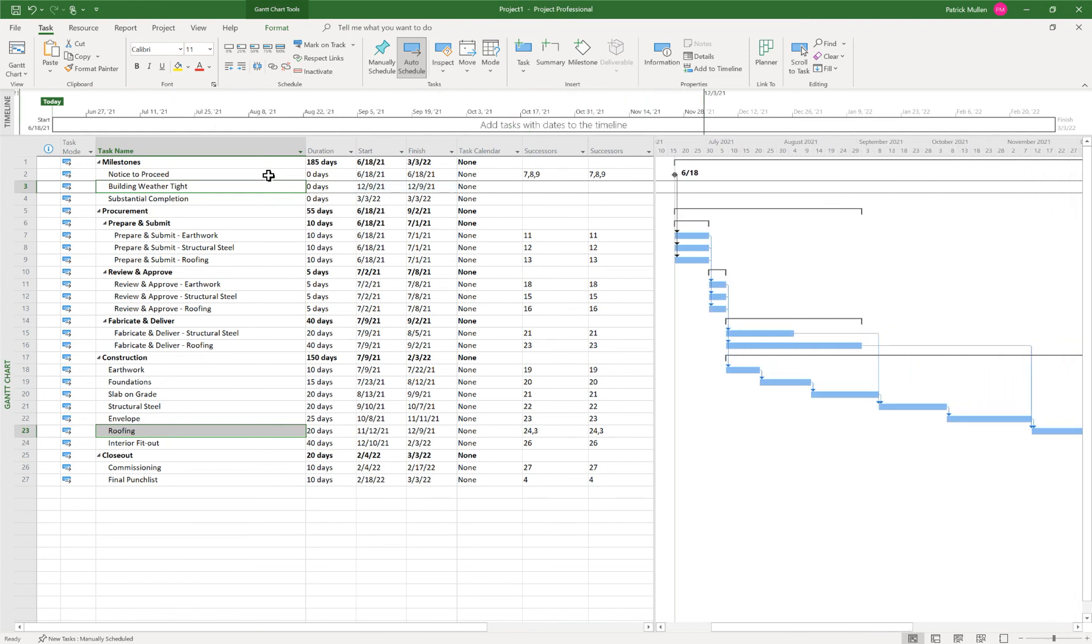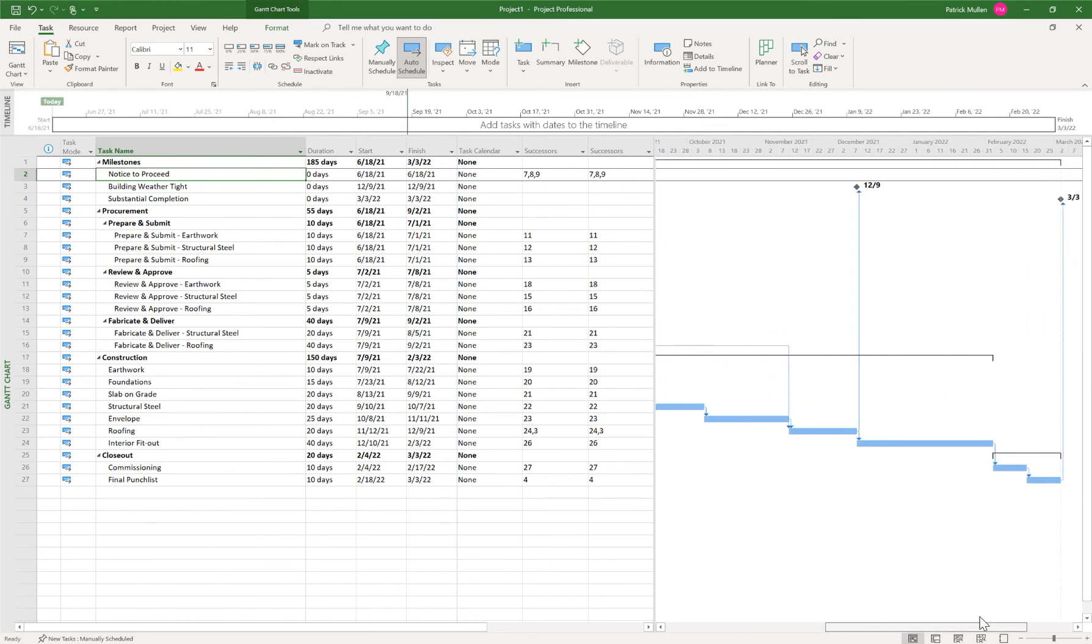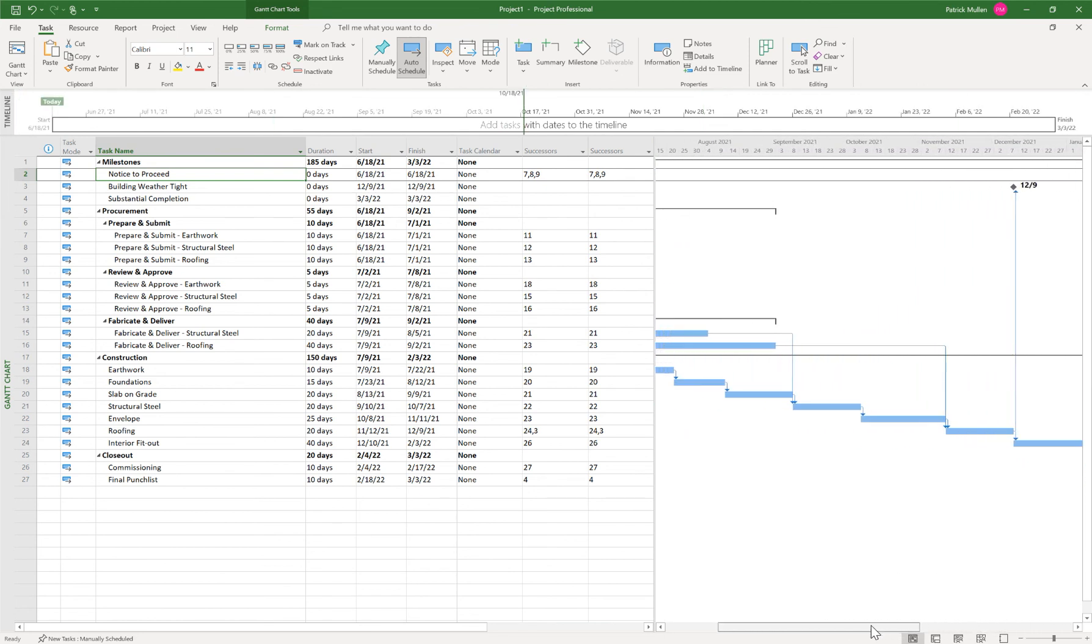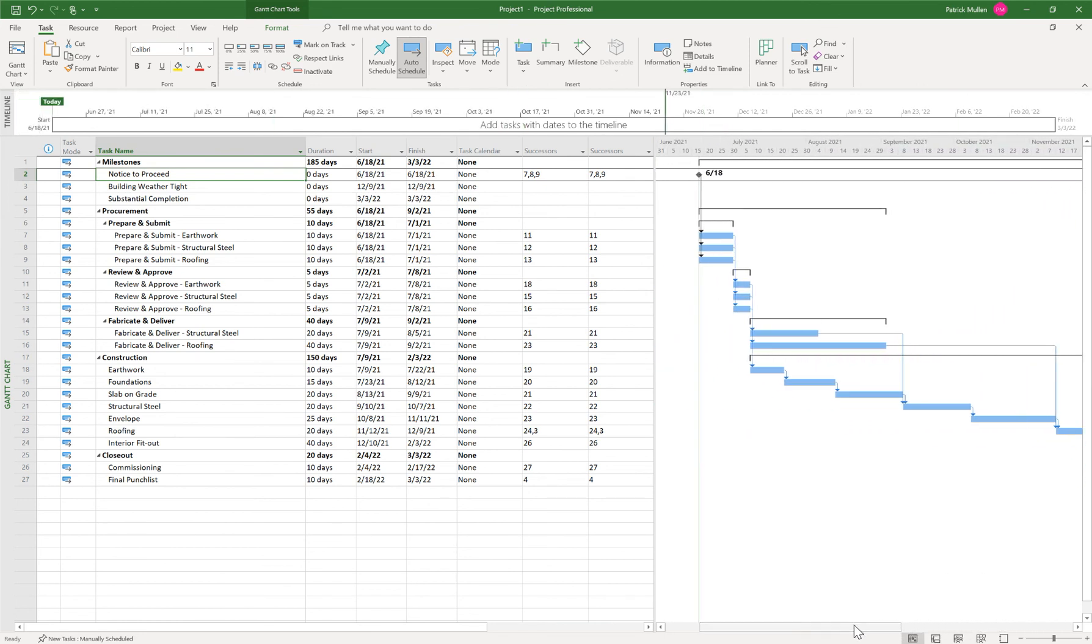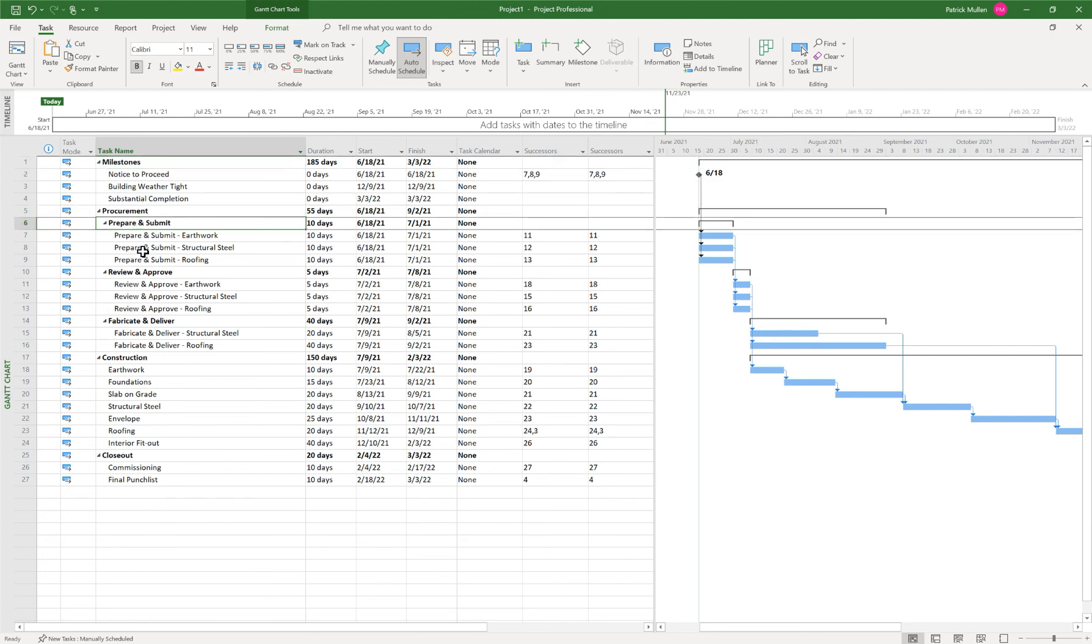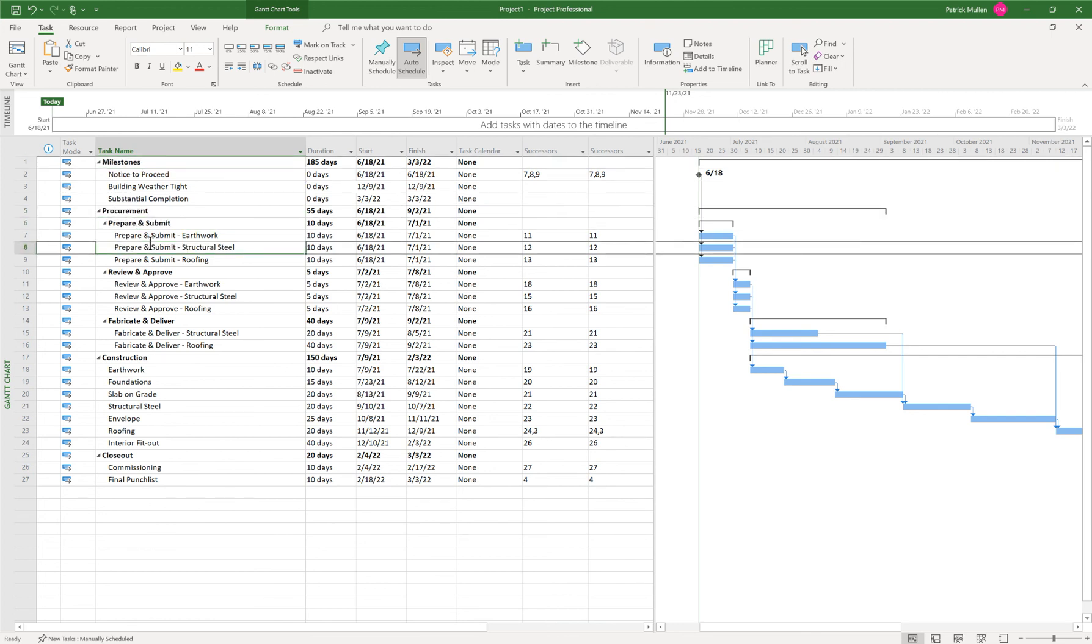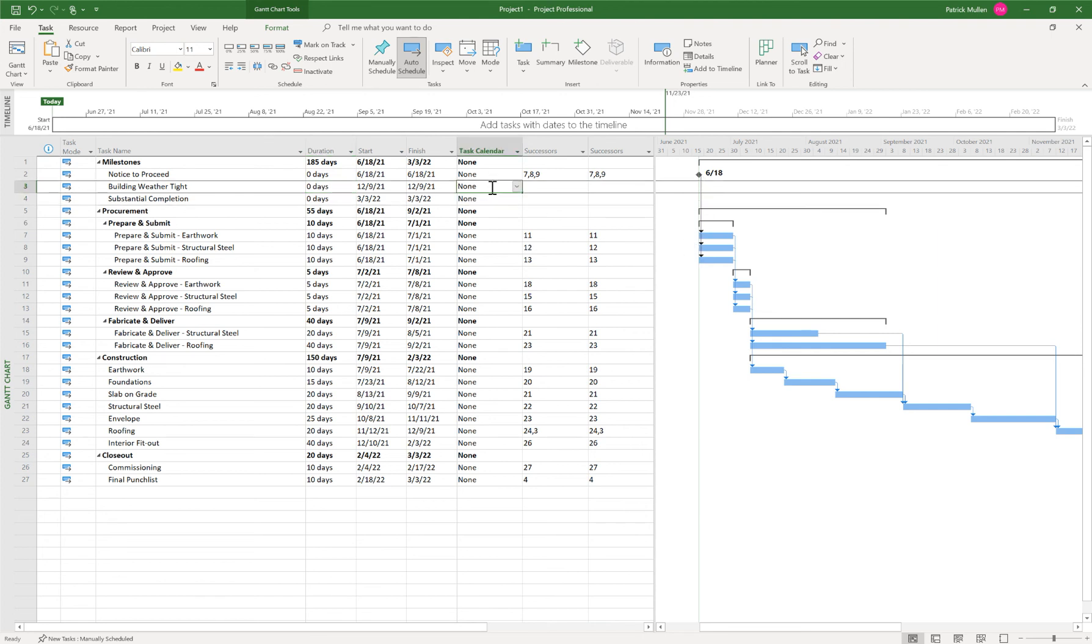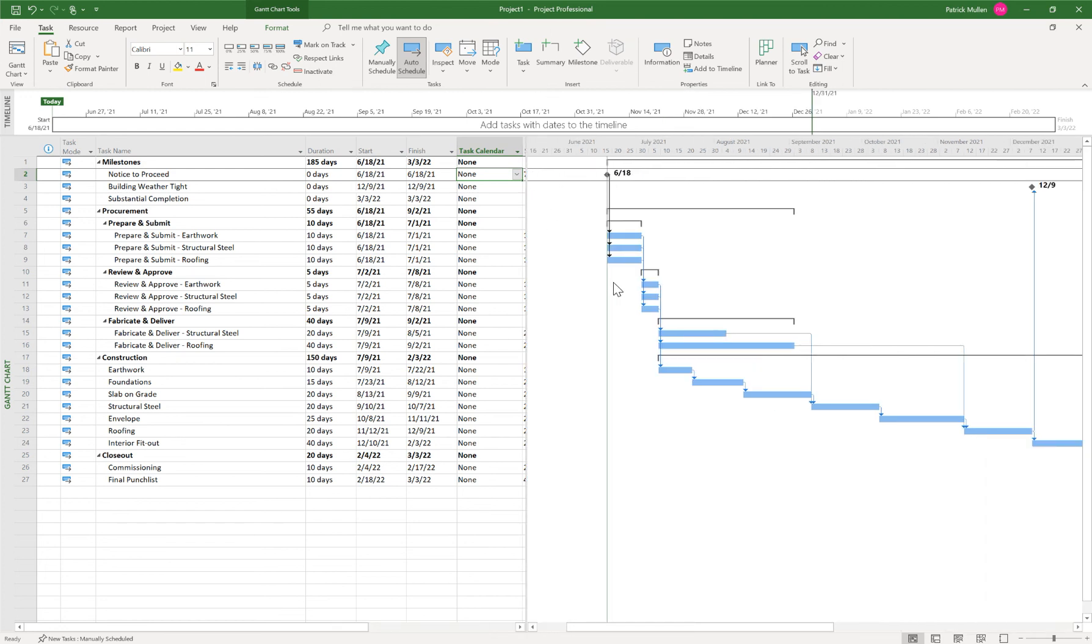So we got our notice to proceed on June 18th, and then we have our schedule going down here. So that's a really simple way of creating a schedule in Microsoft project. We added our work breakdown structure, added some activities underneath, change the activity type based on the duration in there. One of the things that we can do is we could add a calendar if we wanted to, we will do that in another lesson. But at least this will get you started in Microsoft project for creating a really simple schedule. So hope that helps. All right. Take care.